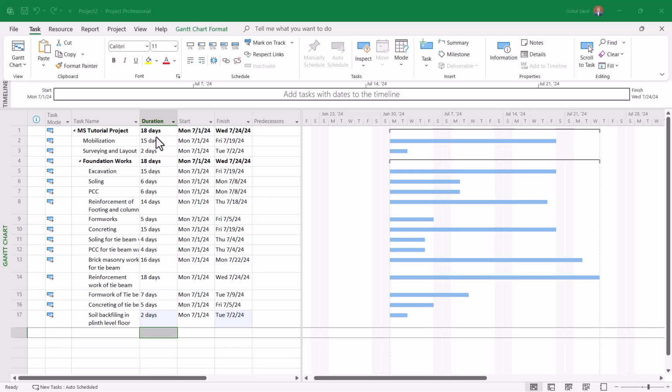So over here you can see the Gantt chart, and you can see the start date and the finish dates and the duration, right? And what the Gantt chart shows over here is that all the tasks start on one day, and this doesn't happen in a project, right? The tasks happen in a certain sequence.